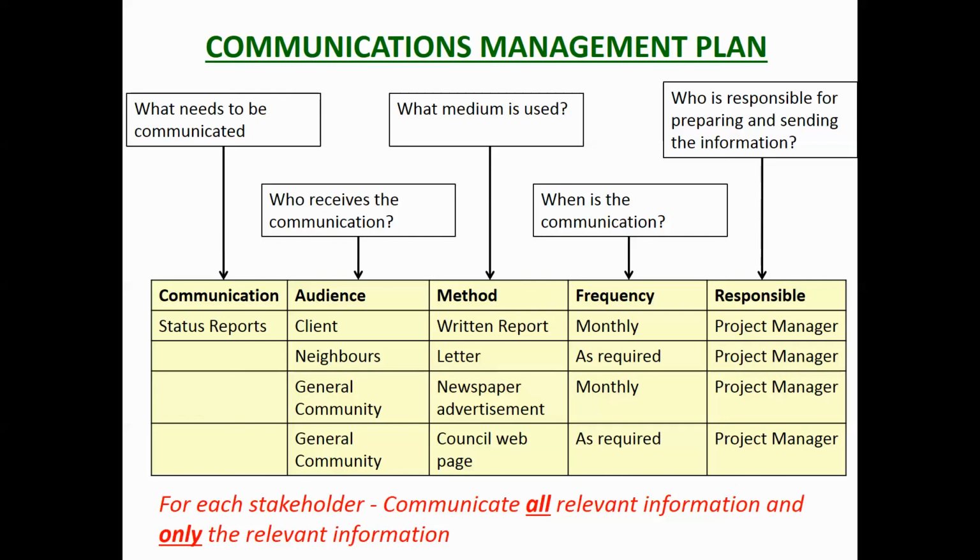Who's the audience? Who are the people that need that information? So in this case here, we've got a status report. How is the project going? The client needs a detailed written report. He needs to know how his budget's going. He needs to know when it's going to be completed. He needs it usually monthly, so each month, and it would be the project manager that does it.